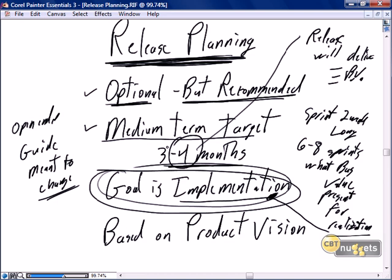As we get into sprint planning and realize halfway through that some work is more complex than anticipated, we may not achieve all of that business value. We can then choose to move our release out to maybe five months, or — recognizing that we want to keep some degree of predictability — we'll keep with our four-month release and scale back, removing some of the expected business value functionality from that release.